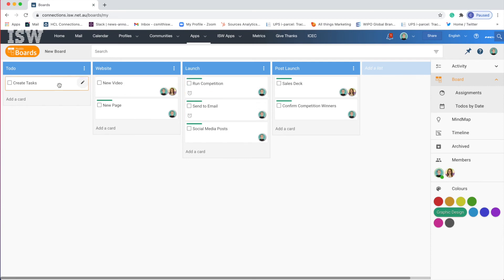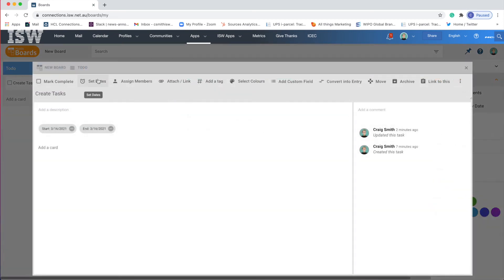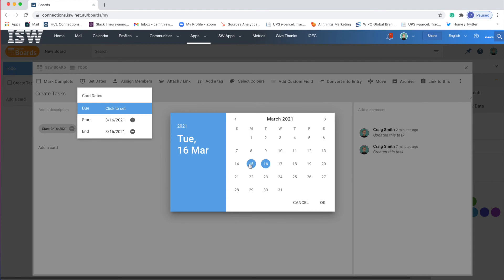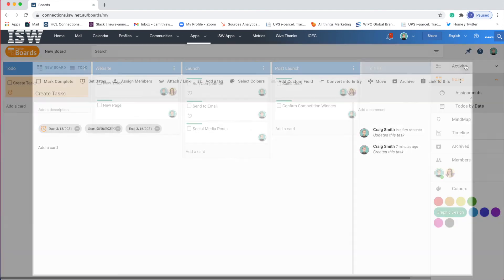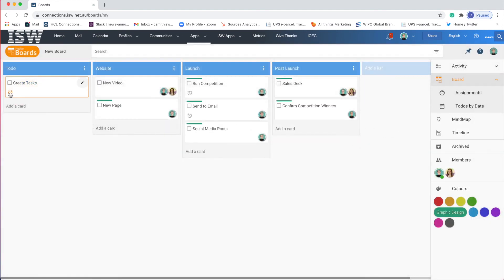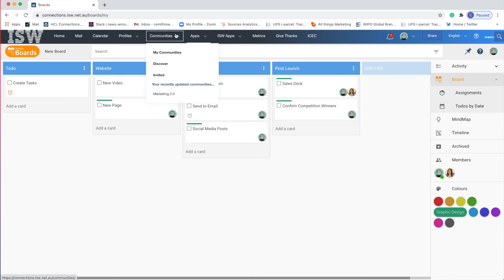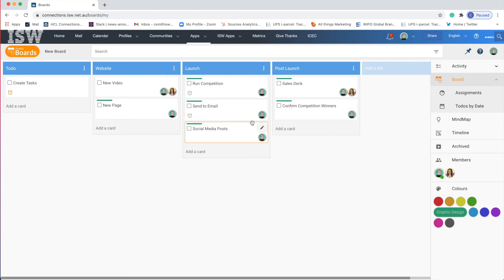If a due date passes, so let's add a due date for here, one that's passed and was set yesterday. You'll see that the icon is orange. So when I come to the board I can see which tasks are overdue by the color of that icon. Another excellent reason for adding tasks with due dates and start and end dates is the assignments and to-do date views.